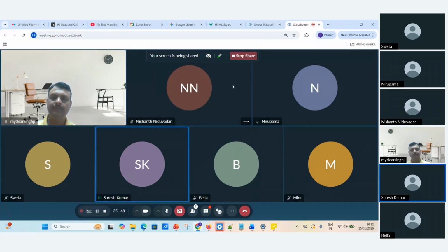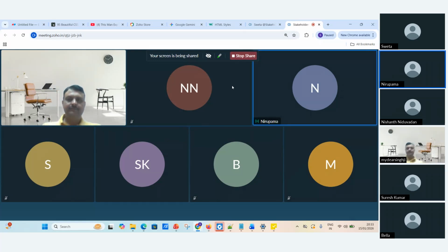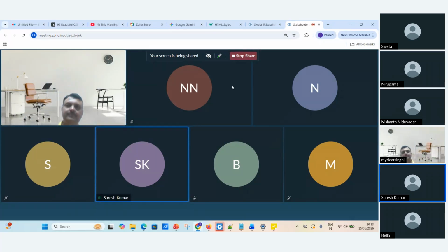We may need to check the time zones of the stakeholders, or the communication channel they prefer, maybe emails, immediate chats like this, or call invites. So we need to take their preferences first, during a survey. We may initiate a survey, or during the discovery sessions, whenever we find time, we could check these communication channels as well and ask what their preferences are. Accordingly, we may agree on and set up the mode of communication with them.